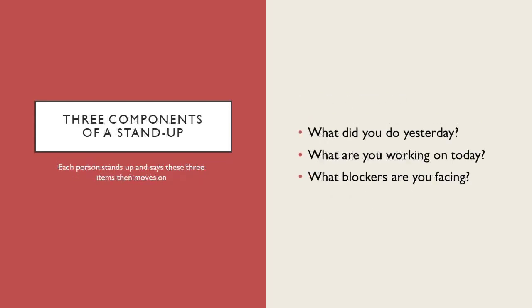But in the real world, it happens. Stakeholders, even the next day, may change their mind, and in which case, reprioritizing and moving items out of the sprint and into the backlog, or vice versa even, are appropriate. Again, the two instances when to adjust the sprint would be if you have capacity concerns or if stakeholders are reprioritizing.